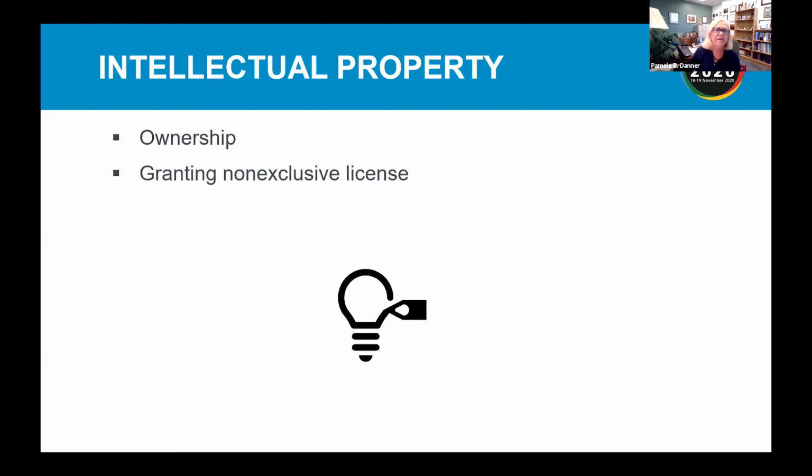Intellectual property. This is your intellectual property we're talking about: your drawings and other documents. The best is for you to retain ownership of your drawings and other documents. However, many times the client will insist that you hand over the ownership of these documents. One pushback would be to give a non-exclusive license instead of handing over ownership. They should not be using your documents on other projects. So I know this is often a matter of negotiation.